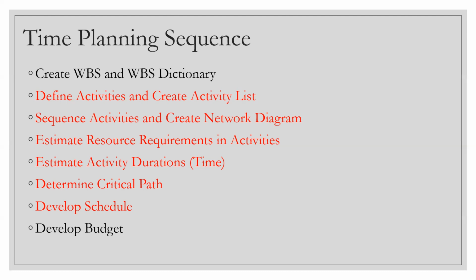Once you list down the activities or the groups of activities you are going to perform, always know that in a project, you can execute the activities either in sequence or in parallel. There is no other way to do it. Sequence means that one activity has a dependency on the previous one. So let's say I've got 3 activities, A, B, C. Maybe activity A is to build a wall, like construct a wall, and activity B can be to paint the wall.